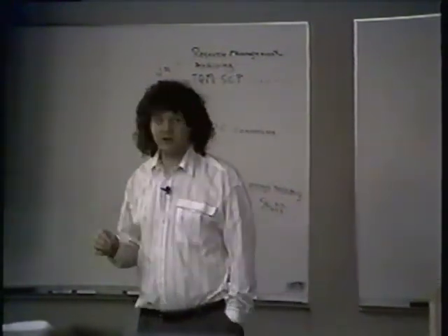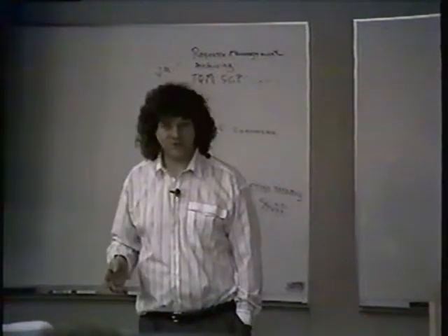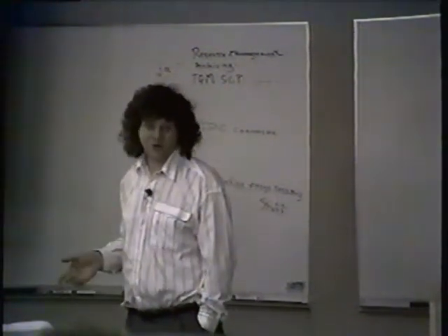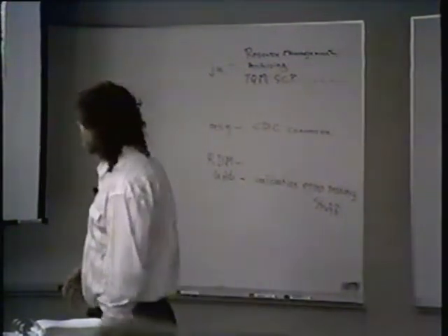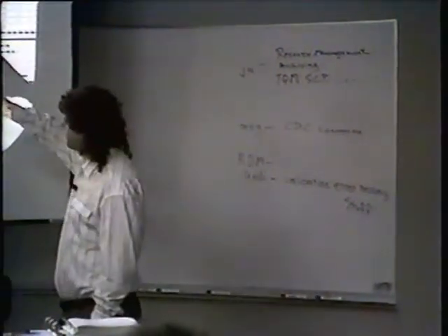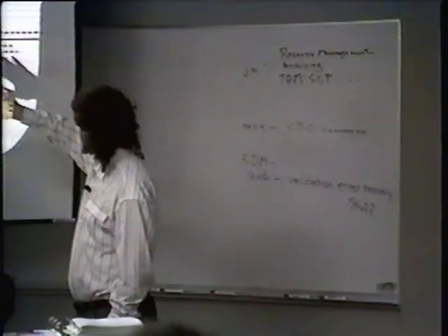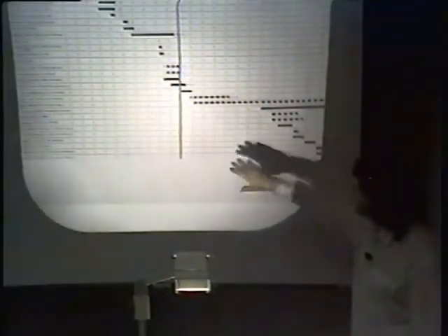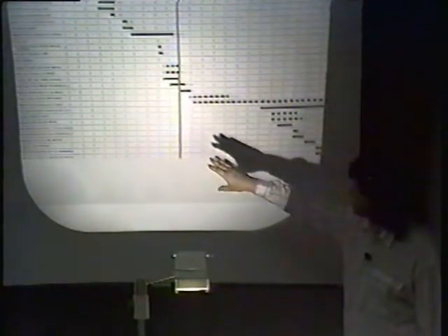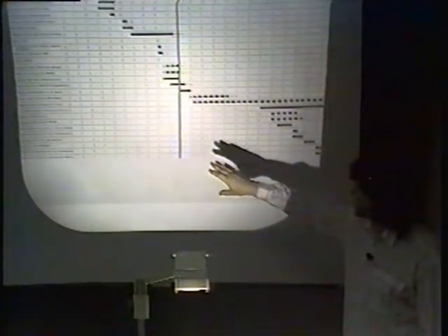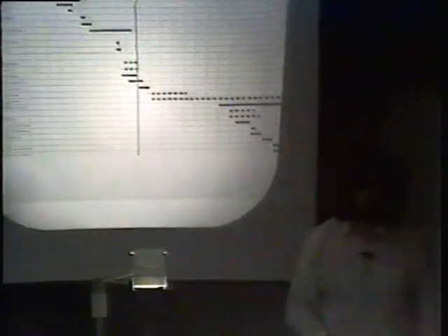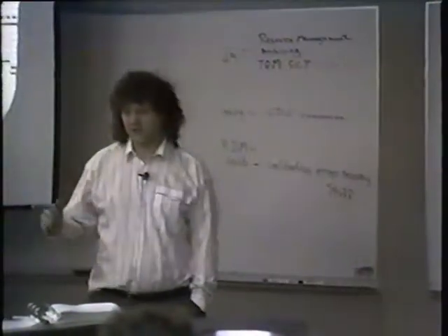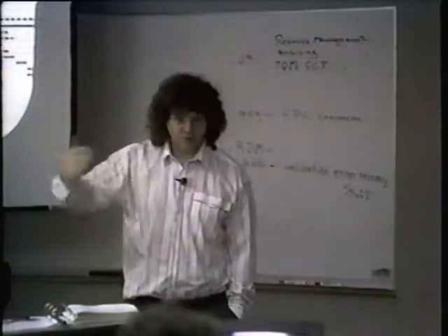And obviously that is a widely varied number depending upon how much work you have in local code. A site like Boeing has probably 50% local code and 50% COS code, and they've got a lot of work to do. Migrating our workloads to appropriate compilers and getting them off of COS into UNICOS occurring in here, that can stretch on. And then we go on with the benchmarks, the factory trial for a new machine, installing the new machine,